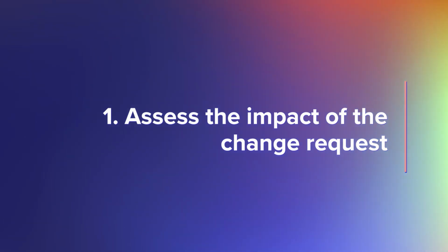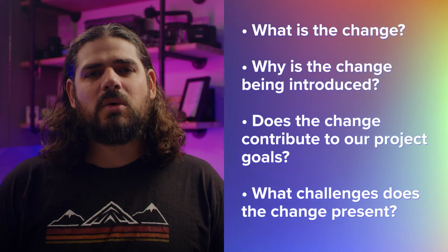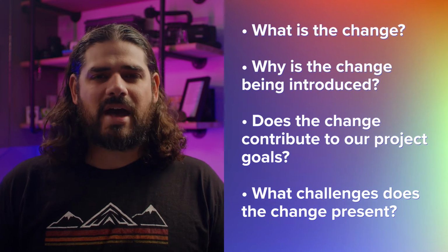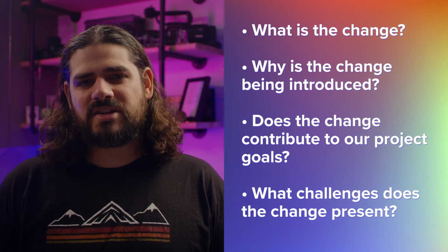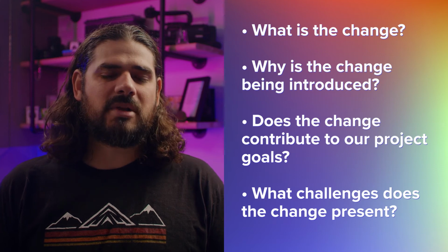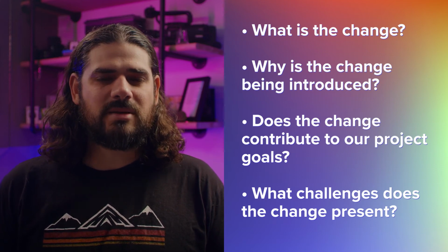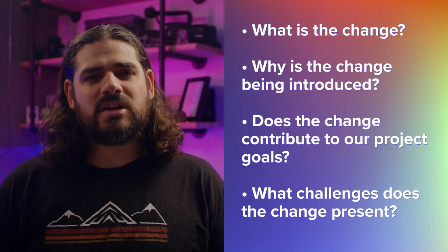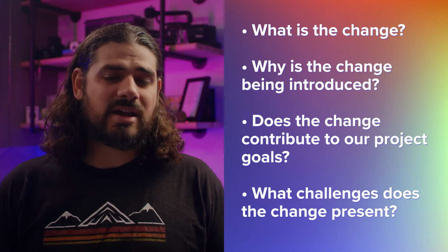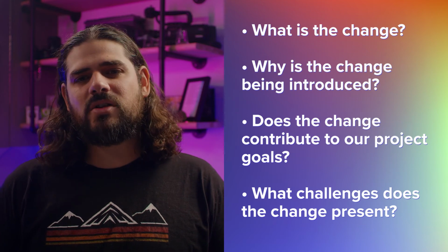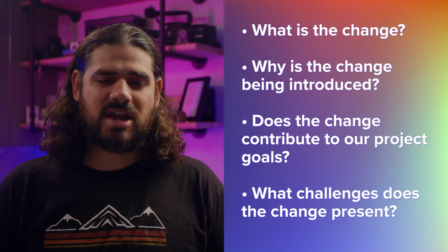When a stakeholder or team member makes a change request, you'll want to inspect it to make sure the change is necessary. Then assess the impacts. Here are a few simple questions to help you and your team determine how to handle the change. Once you've discussed these questions with your team and stakeholders, you can focus in on how the change will impact your timeline and budget. It's a good idea to get your team together to talk about the level of effort required by the impending change.